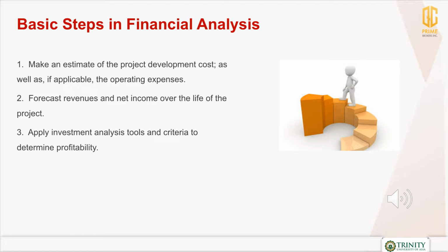Basic steps in financial analysis. These are the general steps followed in the preparation of a financial analysis in a project feasibility study. First, make an estimate of the project development cost, as well as, if applicable, the operating expenses. Second, forecast revenues and net income over the life of the project. And third, apply investment analysis tools and criteria to determine profitability. We will discuss the three steps in detail in the next slides.